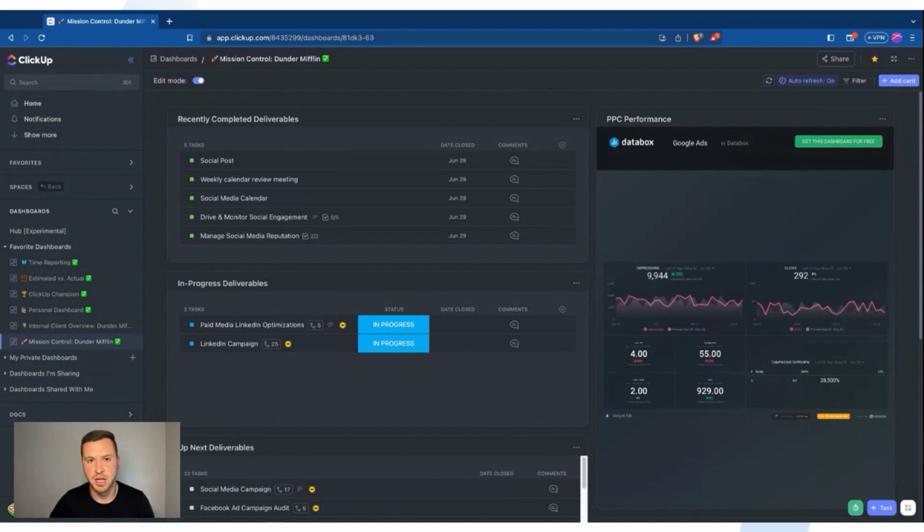Again, this is going to be focused a lot on having sort of the parent task being your deliverable, the subtasks being the action items. That way I only show the parent task, so I don't need to show them all the nitty gritty or our full process into this. So just make sure parent task is deliverable, subtasks are your action steps.